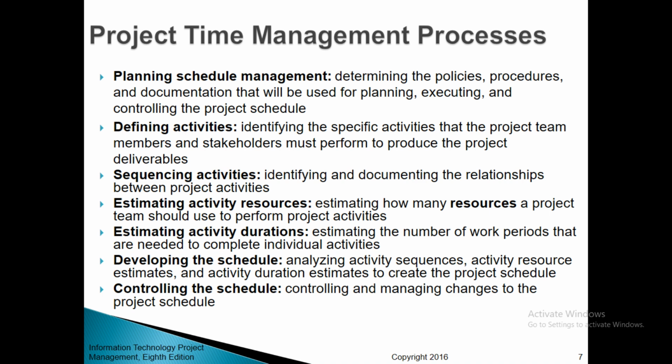Project time management processes. First, planning schedule management: determining the policies, procedures, and documentation that will be used for planning, executing, and controlling the project schedule. Number 2, defining activities: identifying the specific activities that the project team members and stakeholders must perform to produce the project deliverables. Third, sequencing activities: identifying and documenting the relationships between project activities.